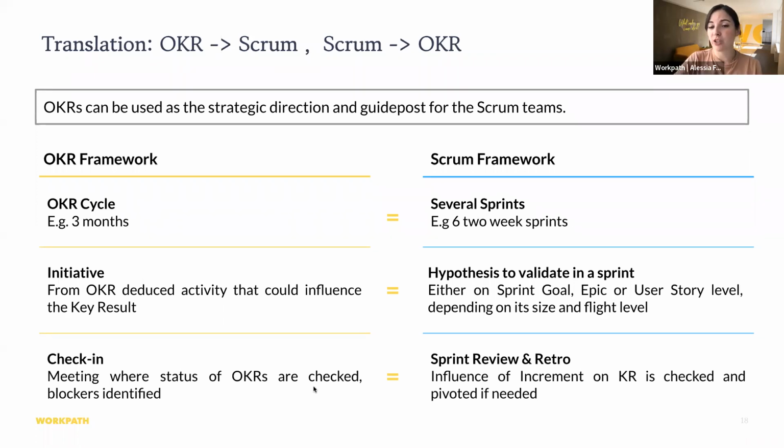And then in terms of meeting integration, a suggestion that we make is that we should check in with the OKRs and see if the output has impacted the outcome. That's something we should do quite regularly. And the question is how frequently? That depends on how your team meetings are set. If you have a bi-weekly team meeting, then you should do it in those meetings. Checking in OKRs every day is probably not a good idea because usually OKRs don't move that fast. The needle won't move that fast. And you have to make sure that the team doesn't get discouraged if they keep looking at their OKRs every day and they don't change. So make sure it's intertwined with your own meeting culture.